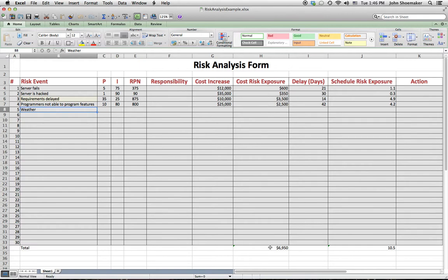You know, the reason why projects go over budget is not so much because we're bad at budgeting the work in the WBS, but these risk events involve work that's not in the WBS. This is above and beyond. So we're actually pretty decent at budgeting for the work that we know we have to do, but we oftentimes don't budget for the work that we don't know we have to do.